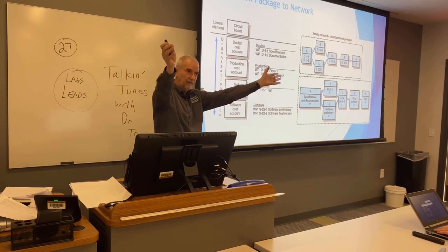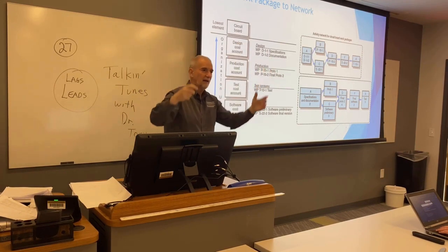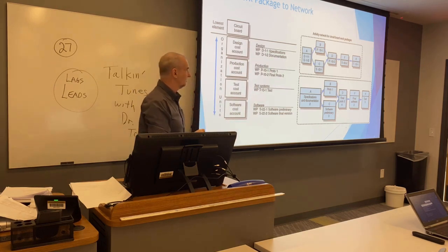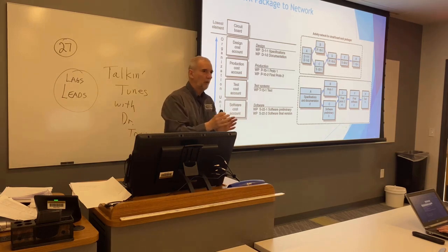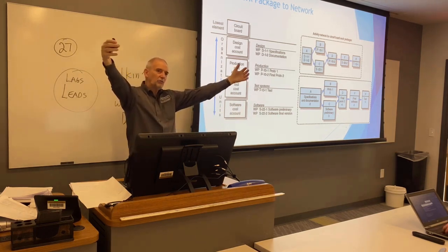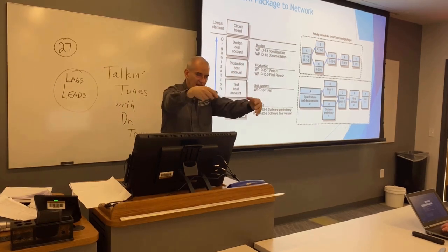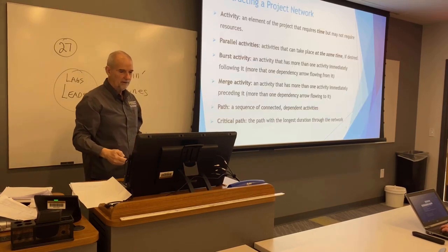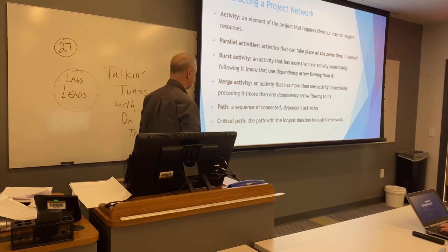You follow me? But then you're driving along and oh my goodness, the 2 lanes, what happens? Down to 1 lane again. You had to merge. So burst is when it goes to 2, and merge is when 2 go to 1. You got it? You'll never ever forget it now, will you? You'll know it forever. That's what's going on.